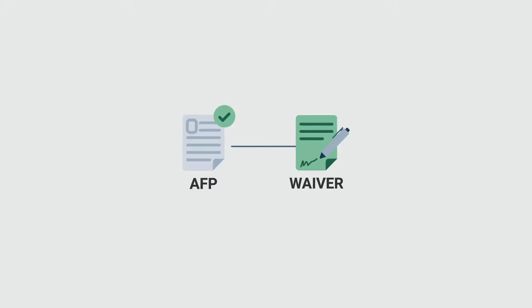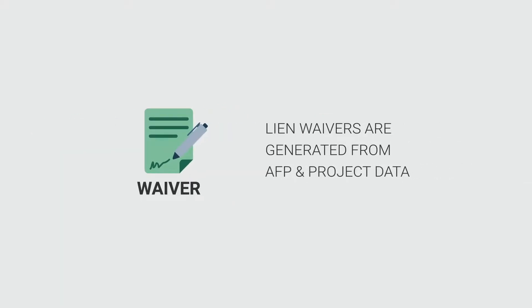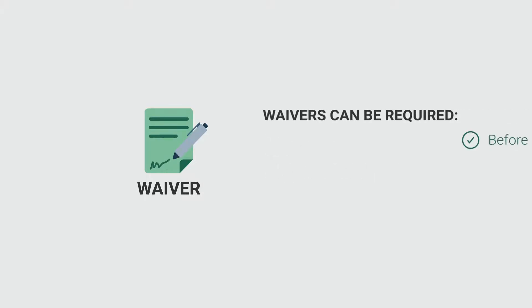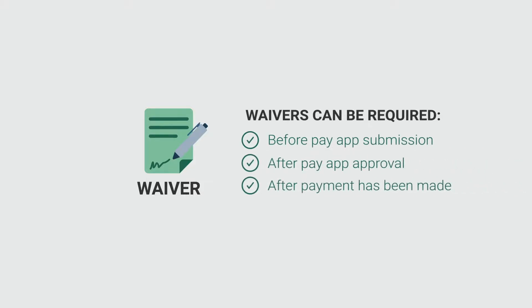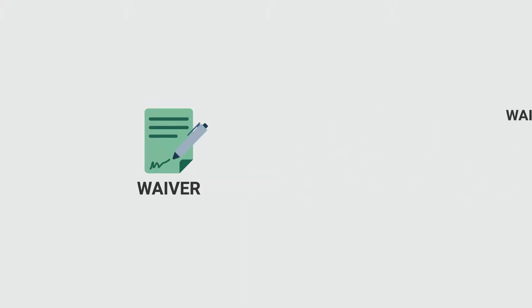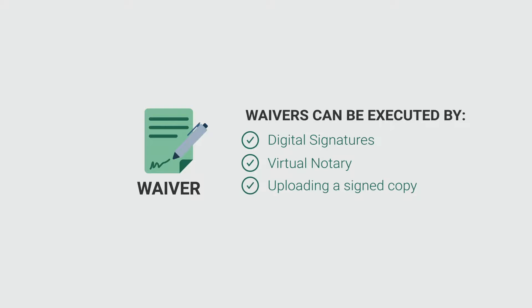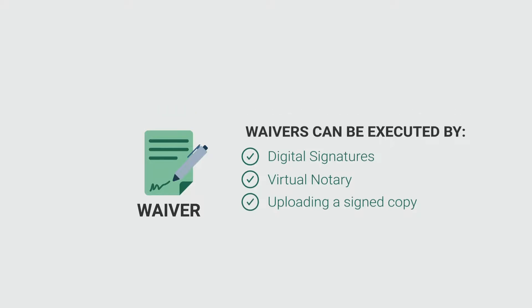Lien waivers in GCPay are generated using data directly from the payment application, ensuring all waivers are accurate. You can require lien waivers at any time during the payment application process, including before payout submission, after payout approval, or after payment has been made. Users can sign or notarize waivers online or upload a signed copy.